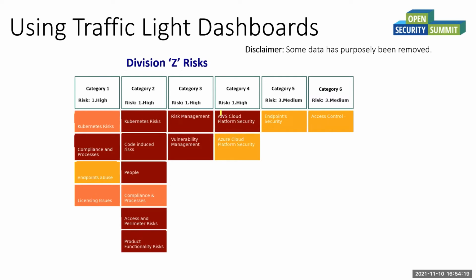So what this gives you is also a sense of movement of what you're doing. So imagine, in each of these zero ticket items, you're now going to have three risk ratings. You have one risk rating, which is where we were 6 months ago. You have another risk rating, which is where we are today, and another, which is where we expect to be in 3 months or 6 months from now.